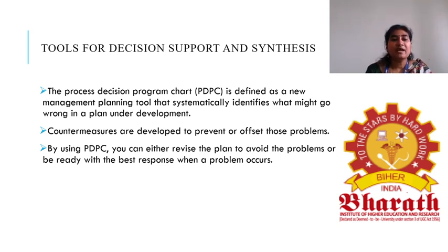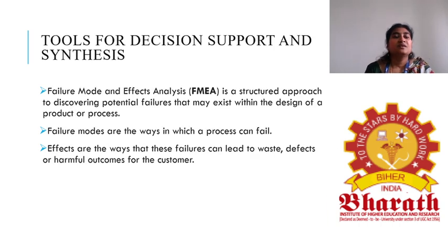It is a new management planning tool that systematically identifies what might go wrong in a plan under development. Countermeasures are developed to prevent or offset these problems. By using PDPC, you can either revise the plan to avoid the problems or be ready with the best response when a problem occurs.